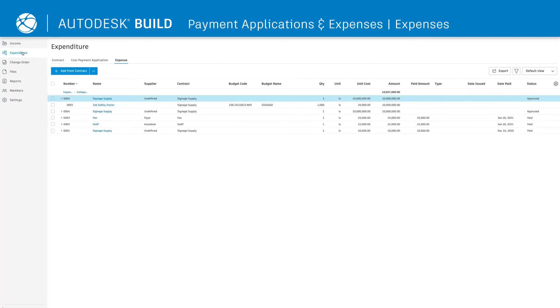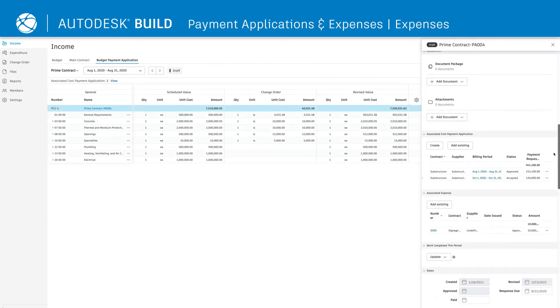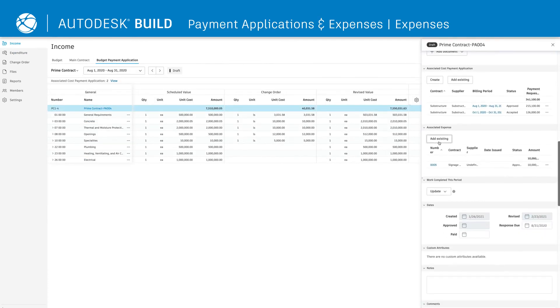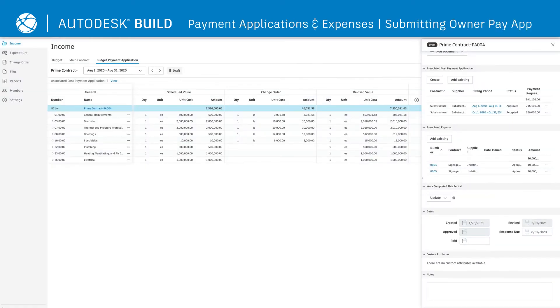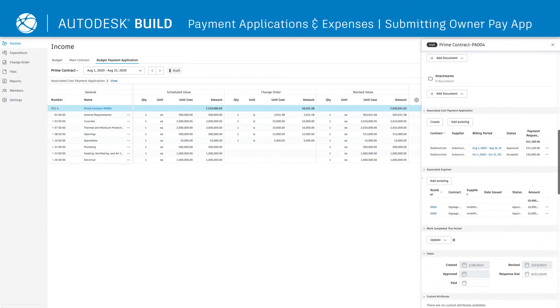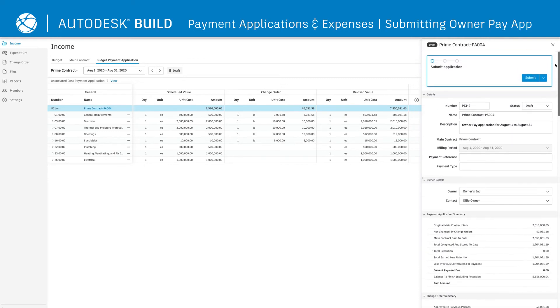Expenses can easily be added to owner payment applications by clicking Add Existing Expenses and selecting the desired expenses. Once all of the necessary supplier and expense information is in the owner payment application, click Submit.